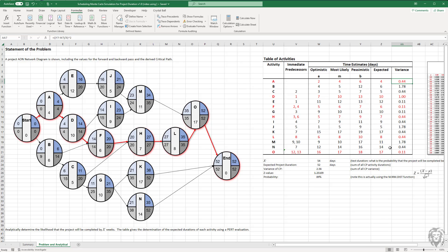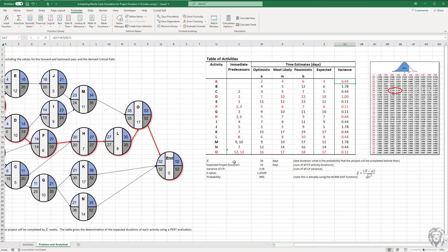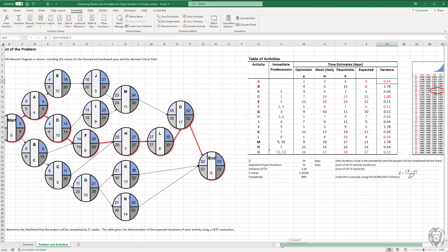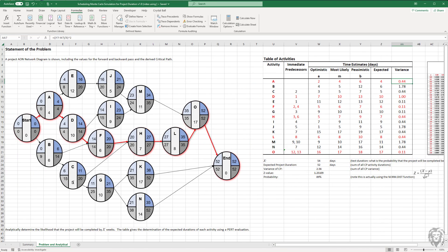We do that for all our tasks, and we do our forward-backward pass through the project, and we're able to identify the critical path, which is the red path here. Obviously, we have a bunch of possible other paths going through the project. You absolutely can do an analytical analysis of your critical path and understand the uncertainty of it, but it doesn't capture the convergence bias of different possible paths particularly well. With the Monte Carlo simulation we're going to do today, we should be able to get all of that.